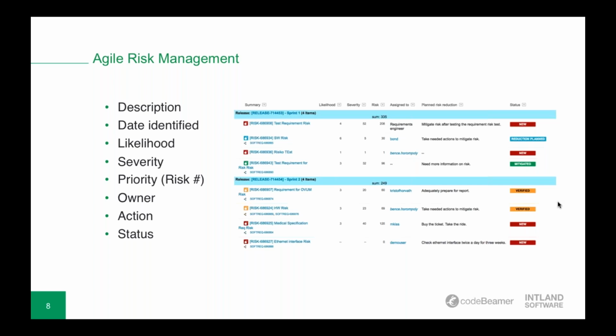But after you decide to adopt the risk management process alongside your agile methods, you have to remember that you still have to enforce these processes and these methods, which can be difficult if you think about it, working in small self-governing teams like in Agile or in Scrum. So risks could greatly affect the success of any end product, which also means that they could harm the profitability of the project, or in extreme cases, the entire company. So one of the simpler methods that traditional project management techniques recommend, which you can really easily utilize in an agile environment as well, is to manage and monitor your risks in a risk register, what you see here.